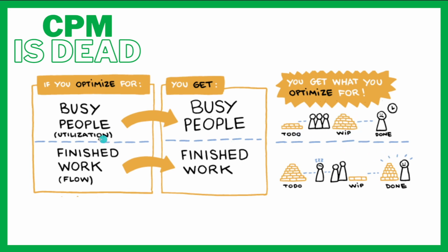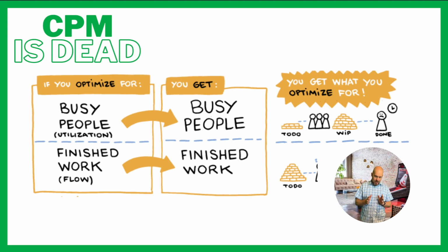Now, I told you I was going to talk about how I know that us optimizing for people staying busy is what we do in CPM. Here's what I'm talking about. When you get your forward and backward pass and you finish something early, what happens to something that's down the line? It pulls in, saying, do it now. Increase your work in process, which is the top. Meaning, keep people busy. Crap, we want to shove the next trade in there, so like pull it forward.